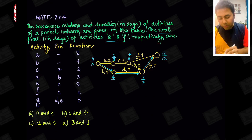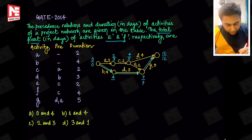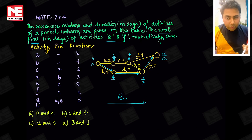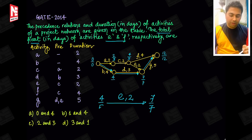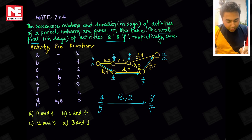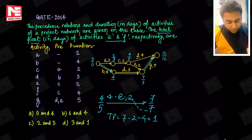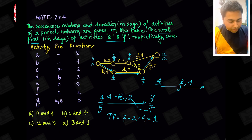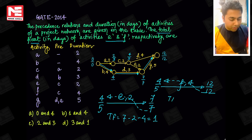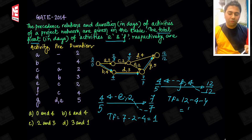For total float: 7 - 2 - 4 = 1. If I look at activity F, activity F has a duration of 4, with early/late times 4 by 5 and 12 by 12. Total float is equal to 12 - 4 - 4 = 4. So the answers will be 1 and 4.